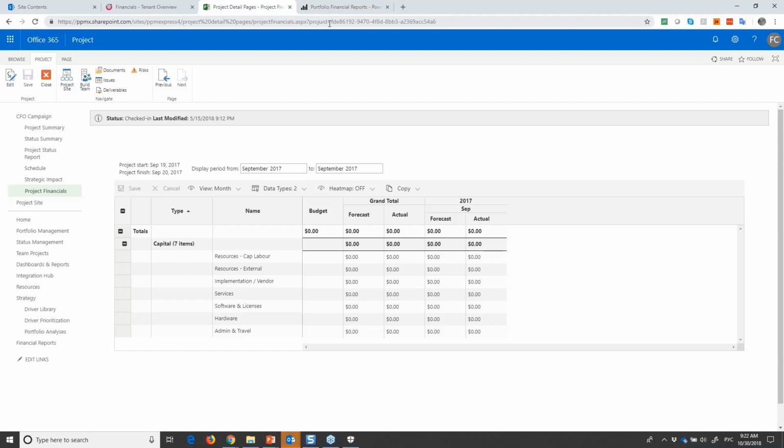The idea is that you have a forecast, and after approval you create a baseline, and after that you start executing your projects. Definitely life is change. Projects have a tendency to change, so you'll probably update the forecast and you will update the actual costs for a project. This is working on managing the budgets and tracking all that information.